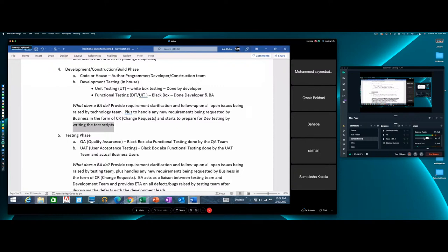In the planning phase, in the project charter, you have your milestones, correct? Correct. And the milestones say that planning will start here, planning will end there, requirements gathering will start here and end here, design will start here and end here, development will start here and end here, and the testing will start here and end here, and then the release will happen on this date, and the application will be live on such and such date.